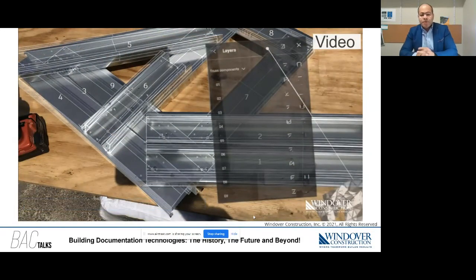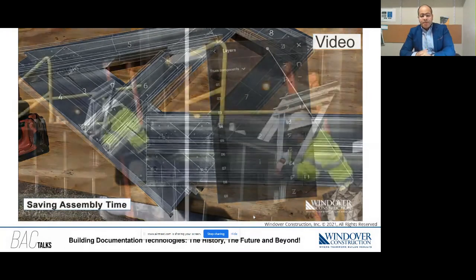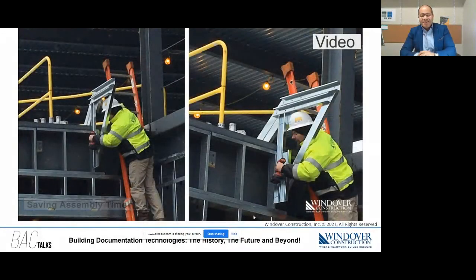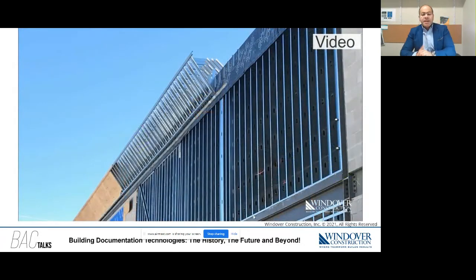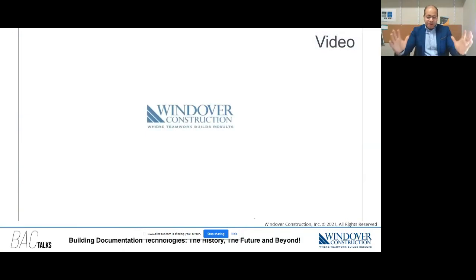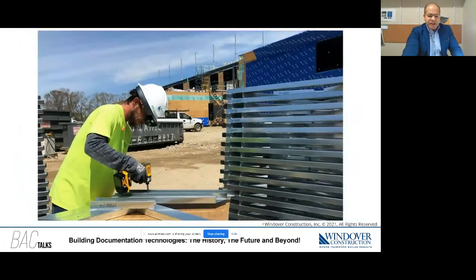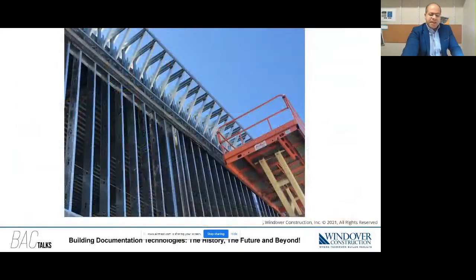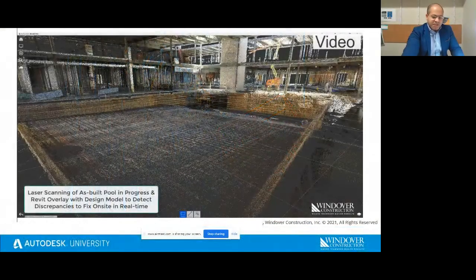With that, we're able to cut the time by 70%. We were able to assemble almost 1,000 trusses in 3 days with only 1 person versus 7 days with 2 persons. So cutting time, and increasing safety because it's guiding 1 person while maintaining social distance. Also, this was during the COVID surge. This is a great example of mixed reality with digital prefab.